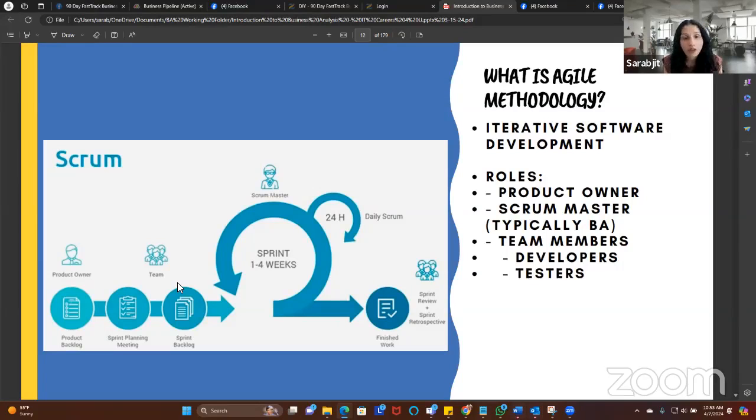So then the other question I get is, okay, if there's a project manager in the Scrum environment in the hybrid approach, what is the job of a project manager? And again, typically what that means is the project manager may be seeing the end-to-end project release versus where the Scrum Master is managing at the sprint level. You may have a PM that's overseeing the many different sprints and managing to the upcoming releases that are coming.